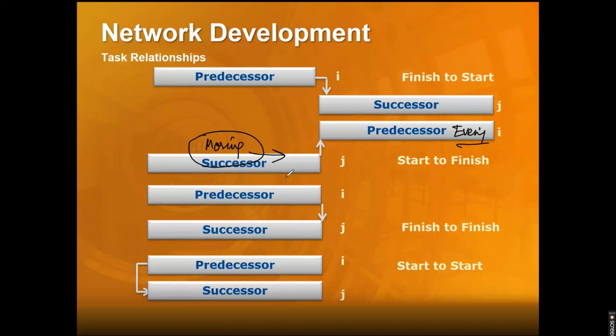Whenever they relieve, the relationship is this: for me to leave the job, somebody has to come and relieve me. The guards do the same job, and so do doctors. Whenever there's a shift rotation, it will be this relationship. So start to finish relationship is all about wherever a shift comes into the picture. One shift comes in, one shift goes out.